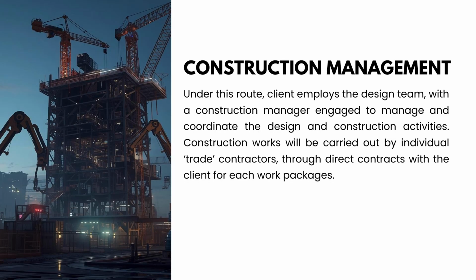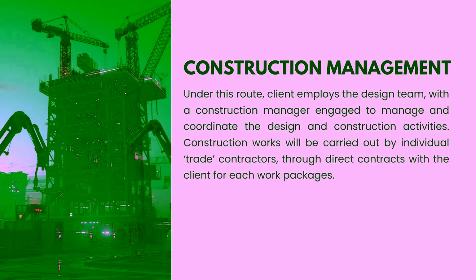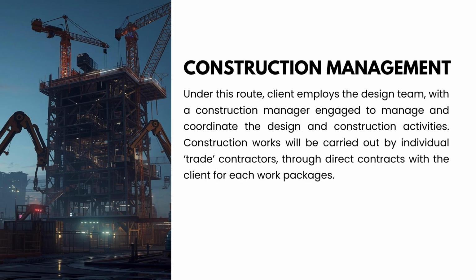Moving on to construction management procurement. In this method, the client appoints a construction manager to oversee the entire project, but the actual work is carried out by multiple package contractors. These contractors are directly contracted with the client. The construction manager's job is to coordinate, manage, and make sure everything runs smoothly on the site. So think of a person who is controlling the overall process while different contractors handle different parts of the work. So that is construction management procurement.